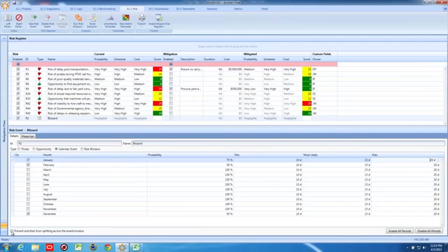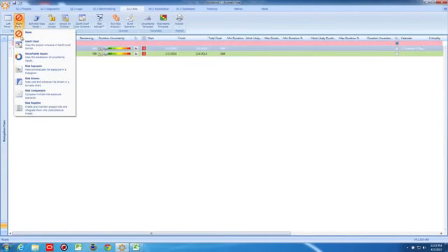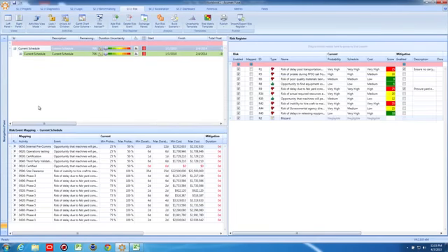Next, we can indicate whether activities can be split across a blizzard, or if the entire activity must finish prior to a blizzard, or perhaps pushed to start after the calendar event. The final step is to map the risk to activities or summary tasks in the schedule. You only want to map this calendar event to scheduled items that would be impacted by blizzard conditions.